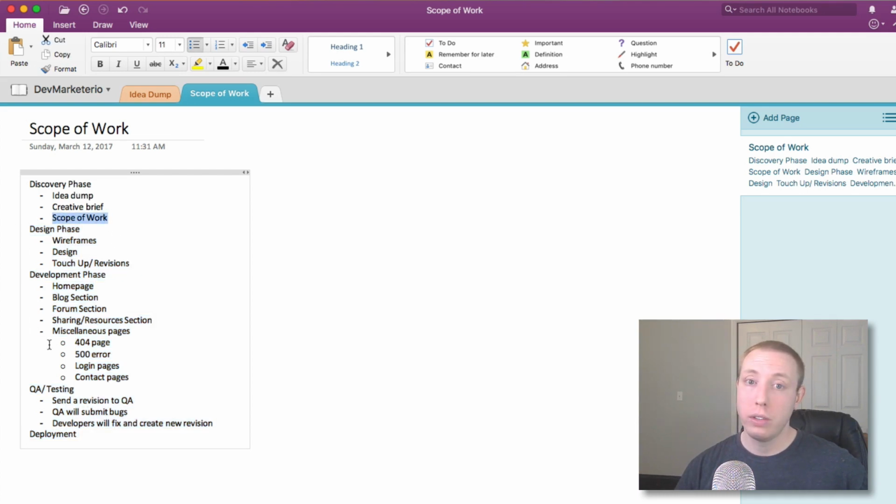I also think it's really important you still do the scope of work, even as a freelancer. If you don't, you're going to find yourself in situations where later, down here, all of a sudden the contact page has to do something crazy that you never expected and that no one's ever talked about before. And this feature all of a sudden is pivotal to this company's success, and now you're going to have to add 2 weeks. It's going to push everything back. You're going to have to go back and redo some of these other sections because it wasn't talked about. You really want to go through and do the scope of work and make sure it's committed before you get into the rest of the project.